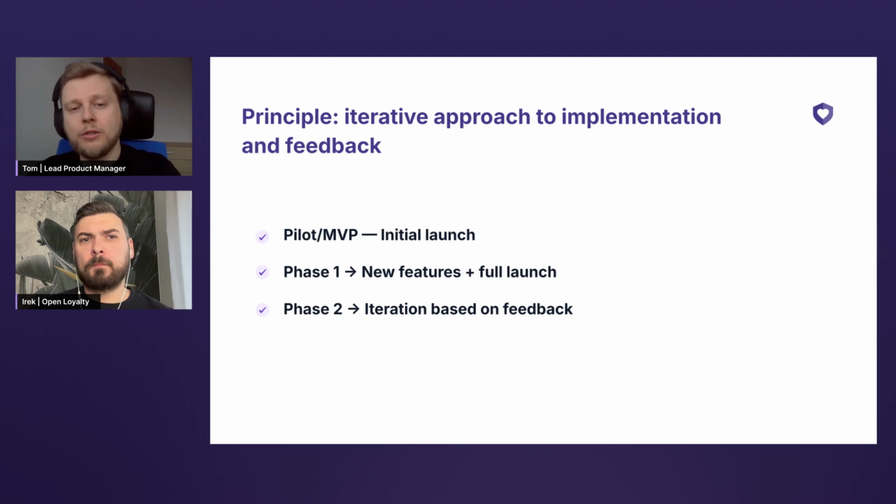So it should give you the early learnings, decreasing the risk of a huge rollout. For example, you can do it for 100,000 members rather than 5 million members, right? You'll be able to validate the assumptions. You'll be able to do this on a smaller scale. So it will be really beneficial for you to move forward to roll out for a much bigger audience.